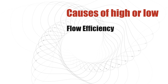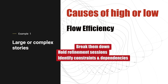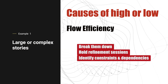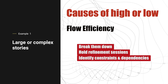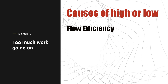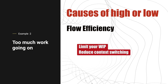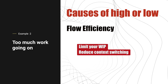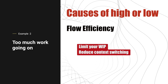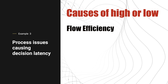The reasons for high or low flow efficiency could be many. For example, your stories are too large — they're too complex — so break them down. Make sure the story has been refined prior to taking it into sprint, and any dependencies or constraints are known. Or it could be nothing specifically wrong with the story, but you're trying to work on too many things at the same time. So limit your work in progress and reduce your context switching. Start by putting a WIP limit on your in-progress column and stick to it — don't ignore it.